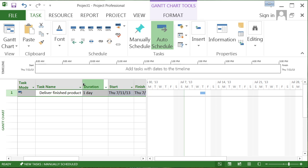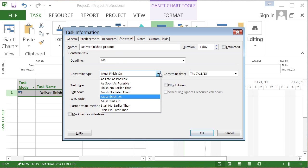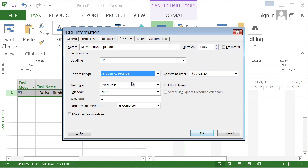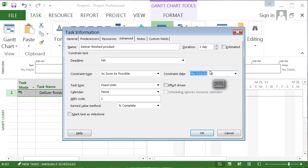So what we're going to do is we're going to undo that and we're going to drop in a deadline. Watch. We'll go back into the task information for this task. And we're going to say, wait a minute. Now let's go back to an as soon as possible. Let's get rid of this concept of a constraint date. I'll just backspace and get rid of that.